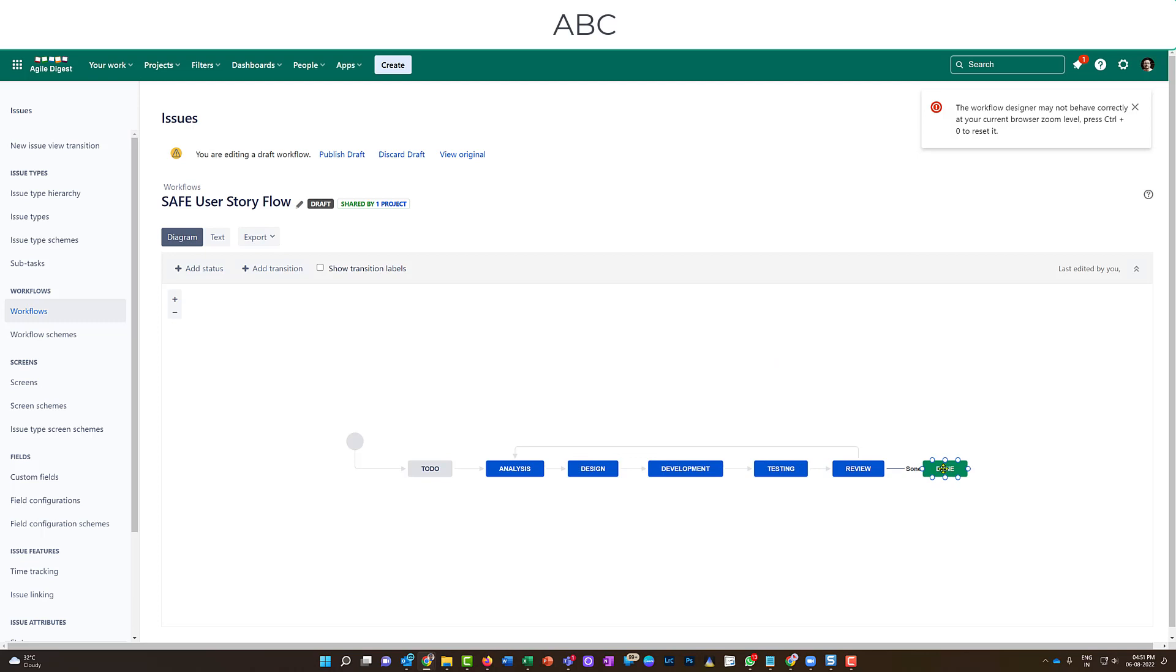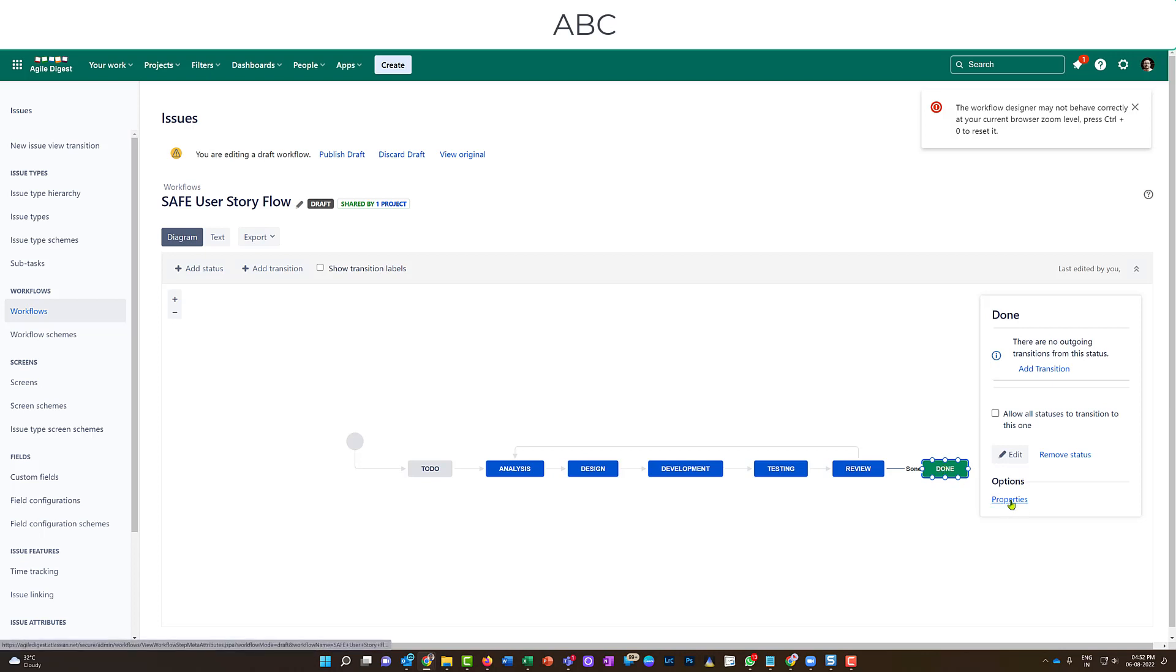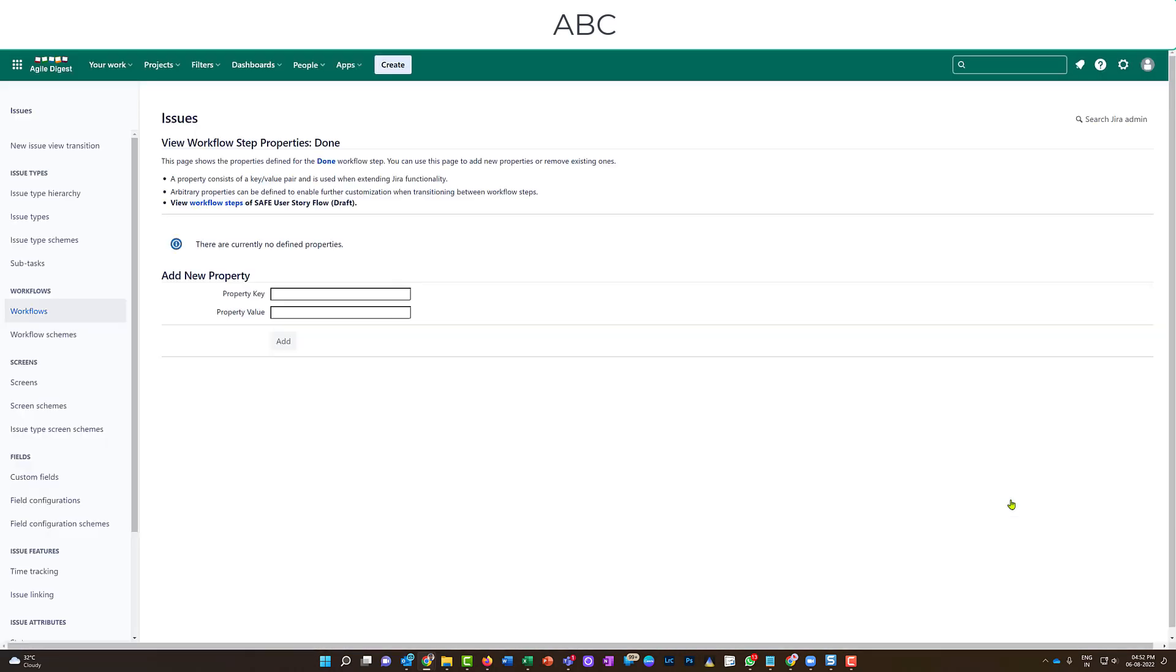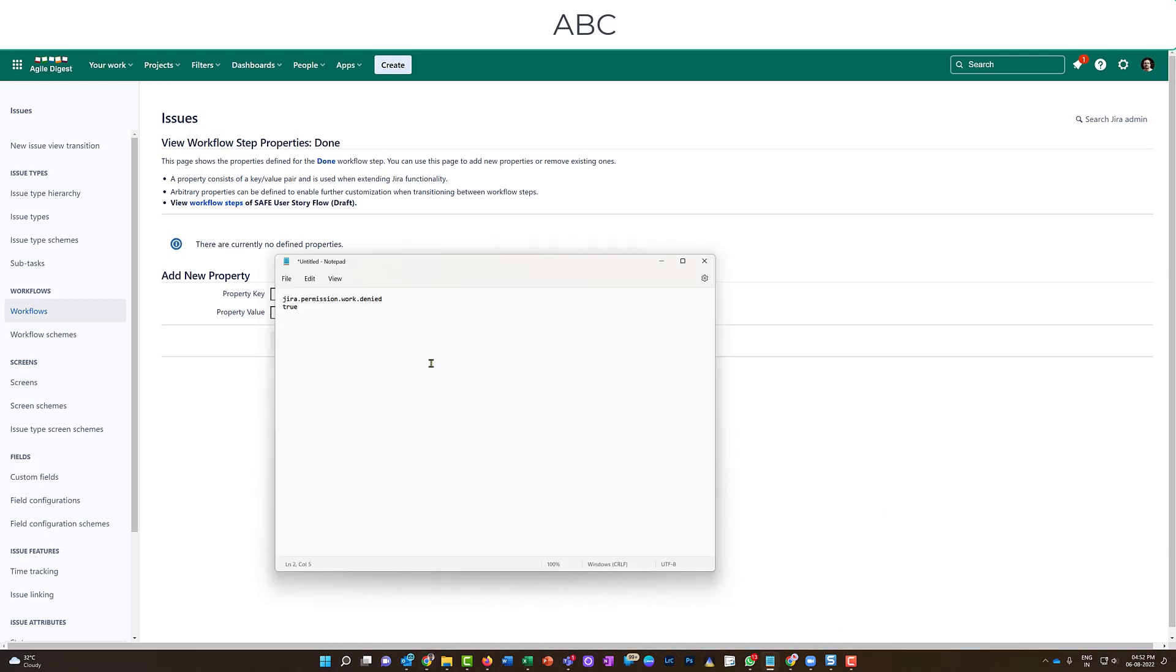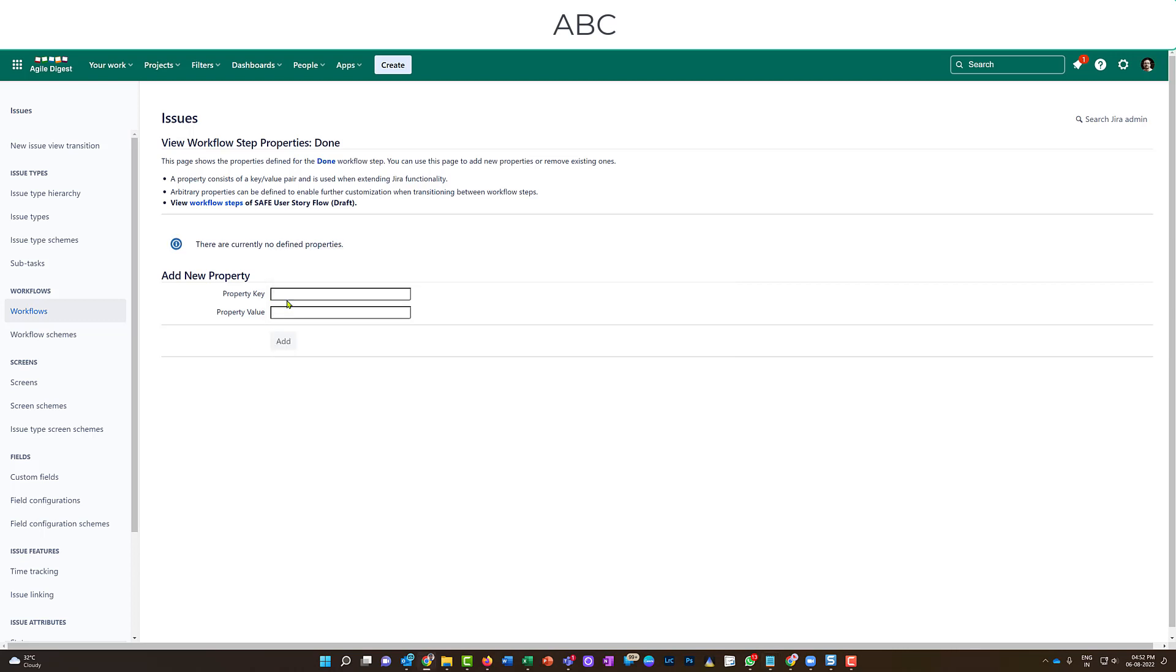Now what I'll be doing: the important thing is this done state. Because once the story reached the done state, I want to restrict them from adding any log time. So I'll click on that. Over here you can see there's something called properties. If I click on properties, it will ask to add a property value and a property key. I already have saved that property values and keys that you can use. This is what you'll be adding: jira.permission.work.denied, and the value I'll be adding is true.